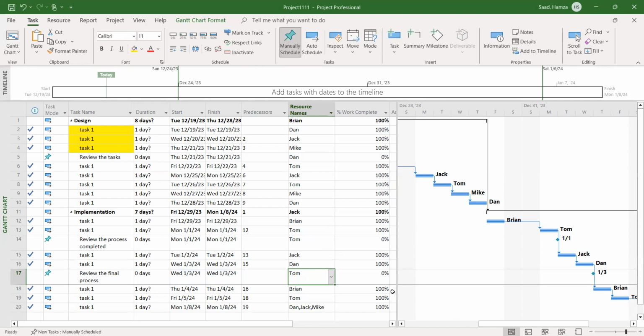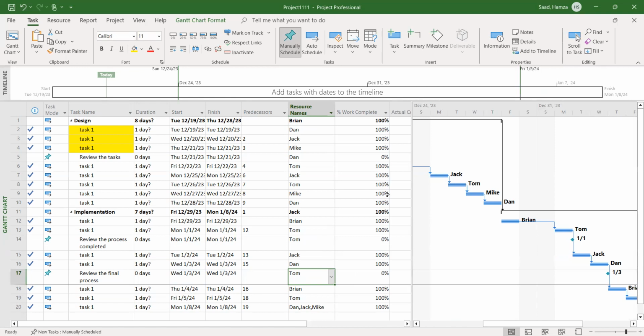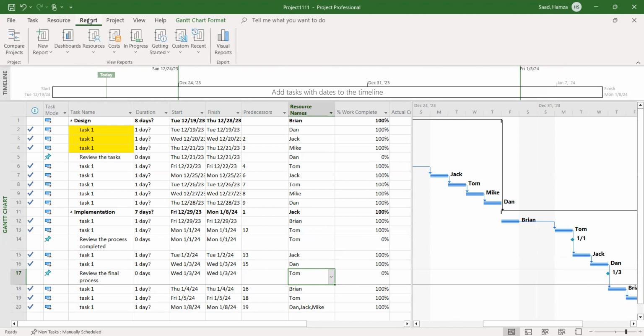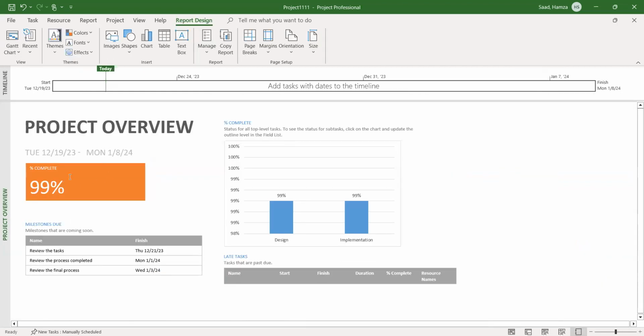Okay, what's going to happen here? What is the effect on my project, because my project did not get confirmed? What's going to happen to my process when I go to report? Now all my processes have finished except the milestones here. I'm going to go to the work here, cost overview or project overview. I'm going to find 99% work completed. Why? Because the work has not been submitted yet with confirmation from the third party that my project has succeeded, or that my project can go on to the next step.